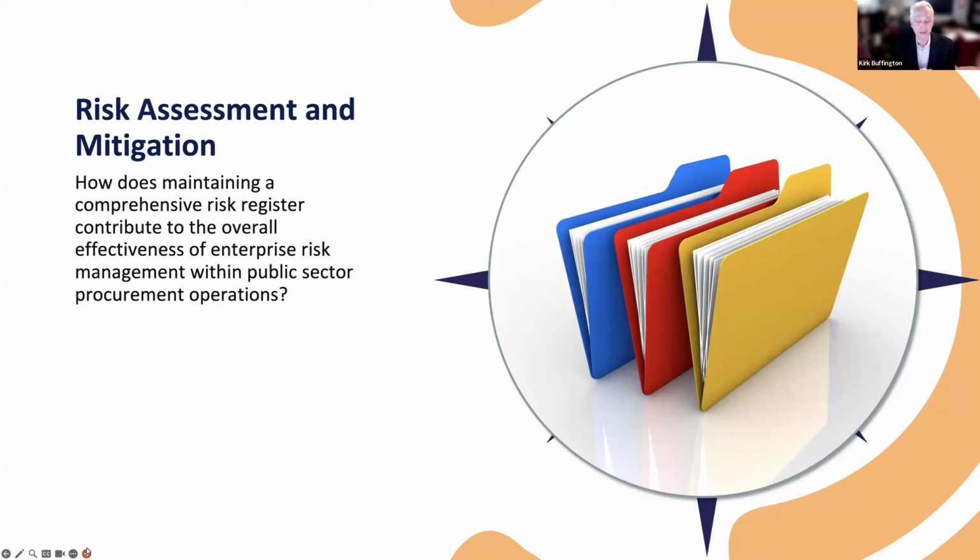A bank's letter of credit, the difference between the bond and a bank's letter of credit is the letter of credit will tie up cash for the contractor. That will be identified in the financial statements as a liability. So that affects the cash flow of the contractor. The surety bond, conversely, doesn't affect the financial statement or the financial strength of a contractor at all. There's no collateral involved. There's no cash involved.